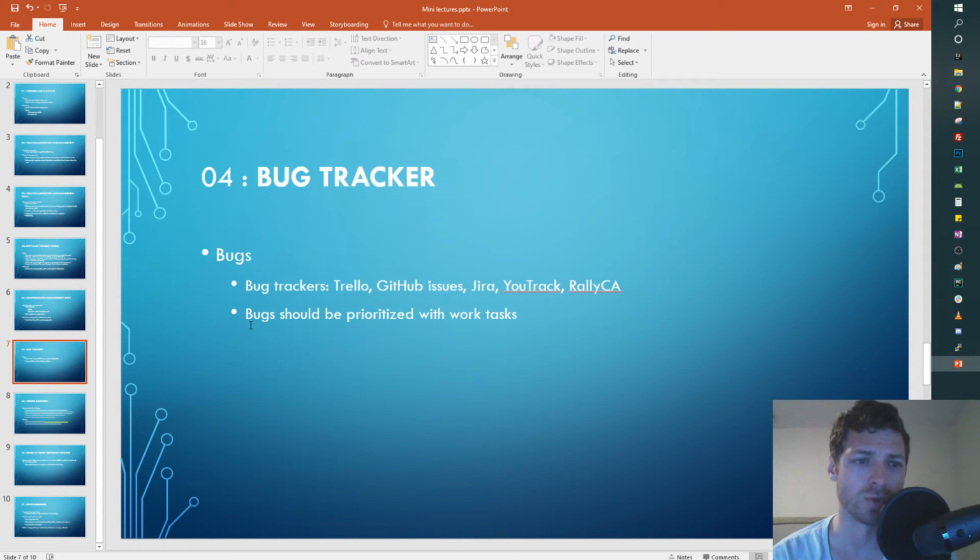Now all stories and all epics are not all equal, so that's where having story points comes in, to weight them. That's really just agile, and sometimes project management can't wrap their head around that. Well, what do story points mean? And they start converting to hours, and that's not really what agile is for, but it can give you a way of measurement on where you think you might be. So that's a concept. So yeah, bug tracker.